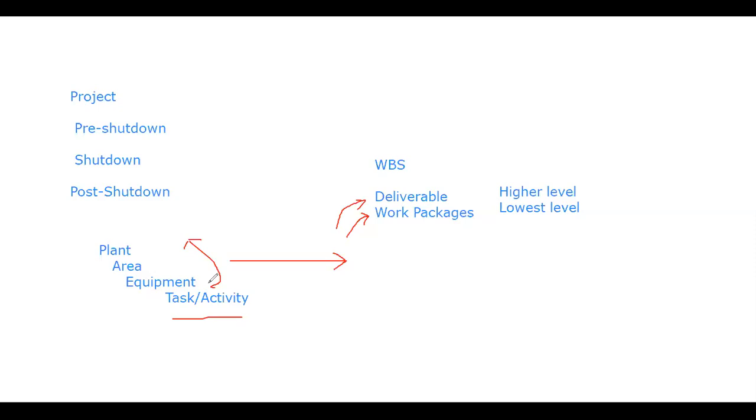Okay, so that is plant, because the work shutdown plant would become here, then the plant shutdown having different areas, then this area comprised of different equipment, with boiler, with column, with separator, with a lot of equipment on that area. And then further you can go into the activity level, but this one I'm going to explain later on. I am right now focusing on these things. Okay, so in this you can see that you have divided this category into sub-levels.